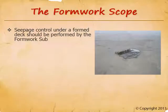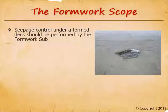Seepage control under a form deck should be completed by the formwork subcontractor. Seepage through joints in wood forms just happens — it's inevitable. During a pour, it's easy to hose the seepage down, dilute it, and it turns to dust. But after a pour, once the seepage is hardened, we have to chip it up — which is not only more costly, but also damages the concrete finish below. The formwork subcontractor is responsible for the integrity of their forms, so they also need to be responsible for cleaning up the seepage. Unfortunately, formwork bidders regularly exclude this expecting the general contractor to do it with their own laborers — but general contractors should not do this. We shouldn't give subs labor for free.